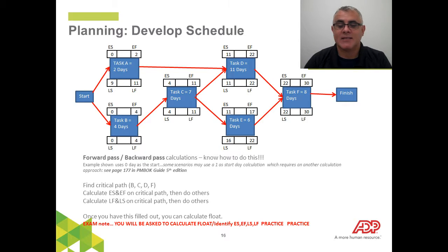So you may have an activity, for example, if we're looking at activity A and activity D, A needs to be completed and then you can start D when we look at that particular pathway. However, there's some time between A and D, and other activities need to take place before you can actually start D. Once you've finished activity A in 2 days, that's all it's going to take. Now, completing activity D, you don't even start that till day 11. So when we look between activity A and activity D, we could really hold off on starting activity A until, let's say, the 7th or 9th day of the project.